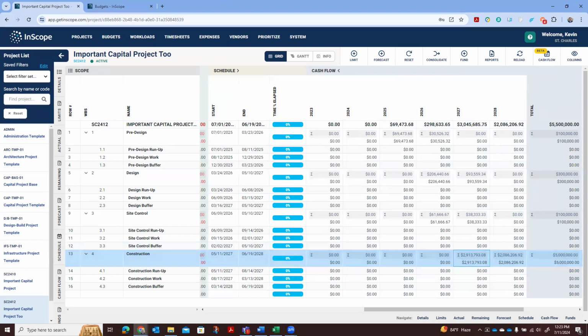But the point is, this is easy to happen, and you saw how easily that was understood just by managing the schedule, by managing the costs that I had allocated, and everything is tied together, I can see exactly when that happens. The question becomes, well, what can I do? What can I do with that money? I can put that money to work doing another project, perhaps. So I could get maybe 2 more designs started for that.